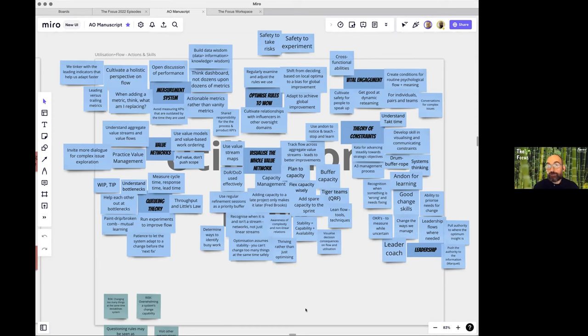So when we're not planning to capacity, when we're lying to ourselves, we're actually harming ourselves. So that's really, really important. Plan to capacity and then deliver to that capacity. And if you've finished the 6 sooner, fine, grab some more and deliver a bit more. And that's how you might improve.